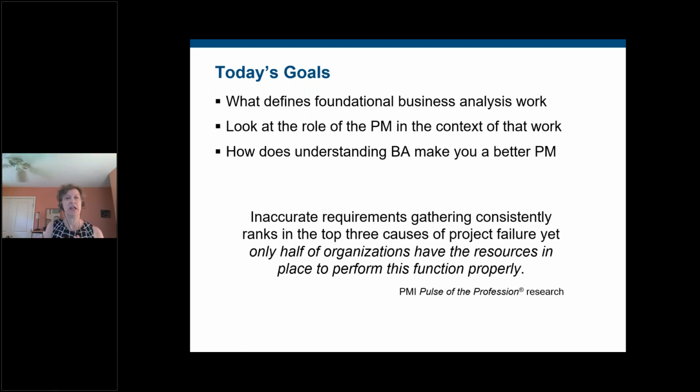In addition, inaccurate requirements gathering consistently ranks in the top 3 causes of project failure. I've run across things that allude to this. You do surveys all the time: what are your top 3 causes of failure? You regularly see that. But the second part of this: only half of organizations have the resources in place to perform this function properly. So here we have projects that aren't getting done, organizations that aren't getting the value that they need out of their projects, and because of requirements. And yet only half of organizations actually have what they need in place to do that work properly.